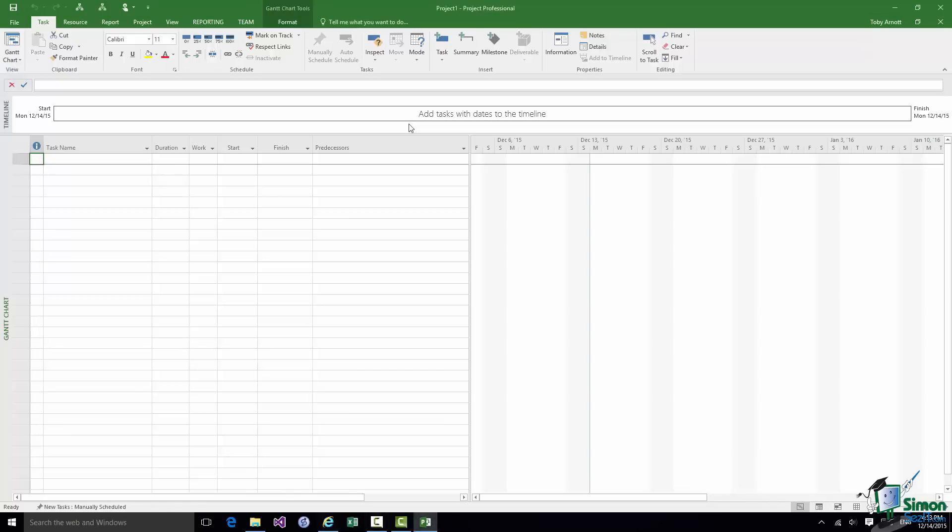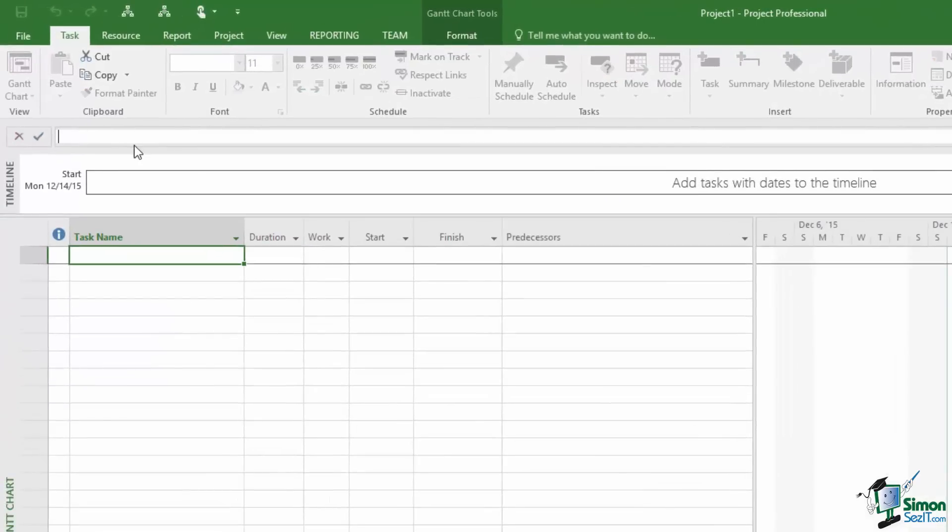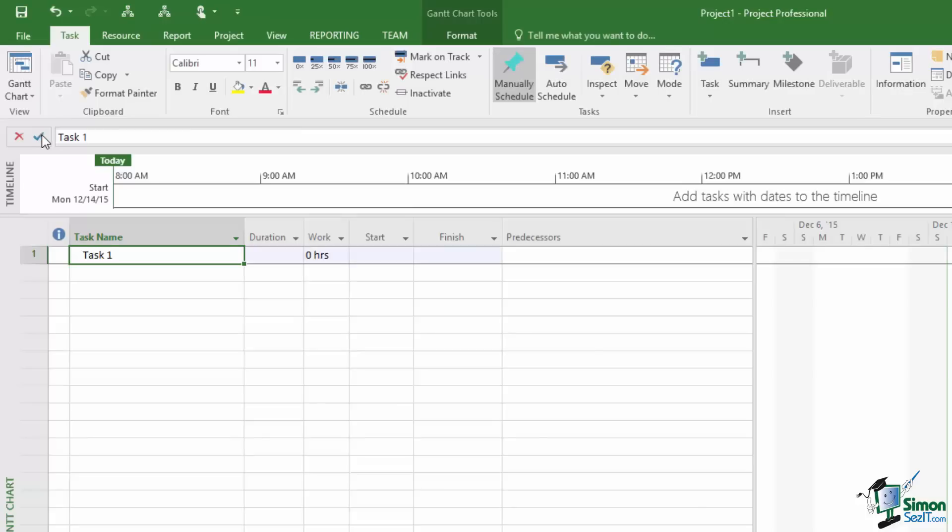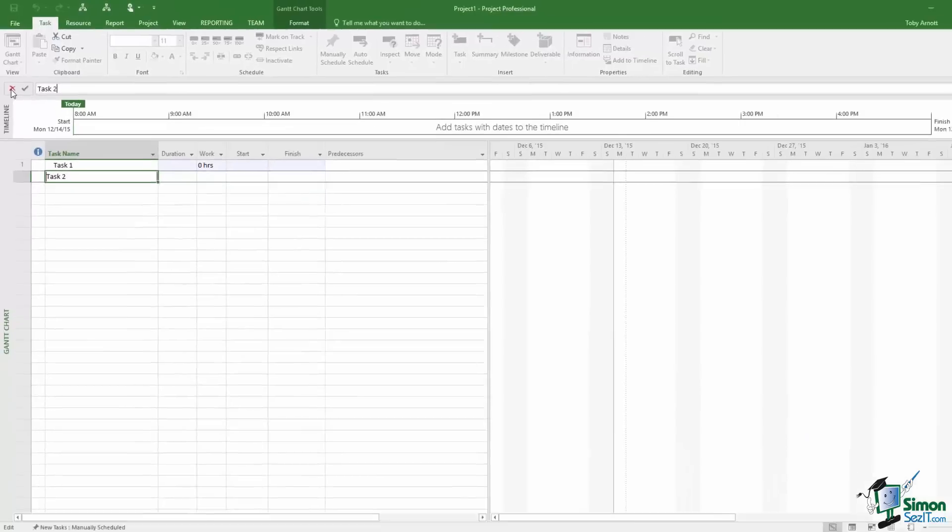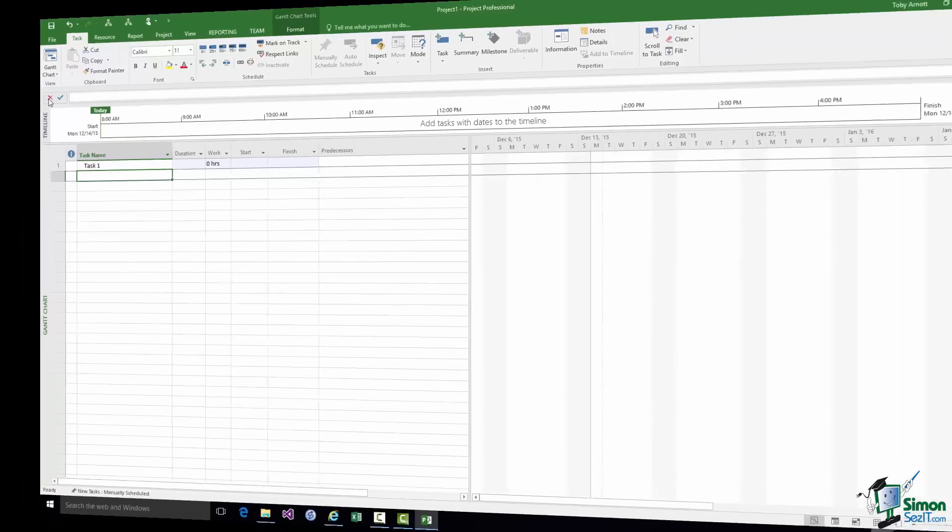And basically the kind of thing we use the Entry Bar for is this. If I want to enter the name of the first task in my project I click in the Task Name field there, First Task Name in the first row of my project. And then if I click in the Entry Bar I could call it Task 1. Having typed that I click on the tick mark to the left of Task 1 and that is the name of my first task. If I click down to the next row and I intended to type Task 2, I could type Task 2, change my mind, click on the X to the left, the cross there, and that cancels what I'm typing. That's the Entry Bar more later.